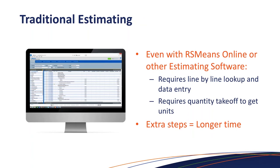Just like everybody else in the digital world, RSMeans data — known for years as the construction cost engineering Bible — has evolved into the digital age with RSMeans Online. But even there, you have to build your total cost by line-by-line lookup or data entry. It still requires a quantity takeoff to get to the unit. Whether it's a material takeoff, CIP budgeting, a main break, or deciding if something comes out of OPEX or CAPEX — all of that has to be built up and it takes time. Even though digital, it's still extra steps and longer time.